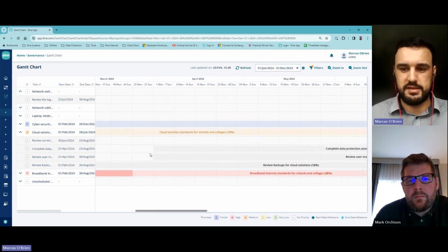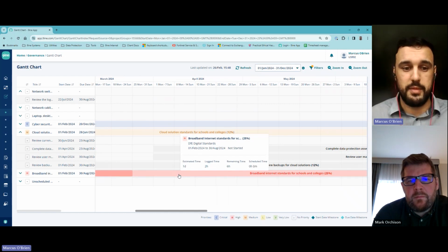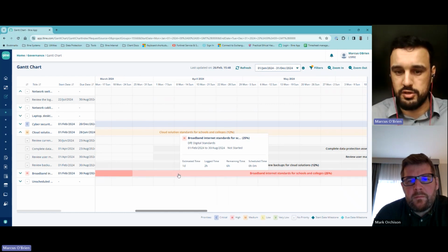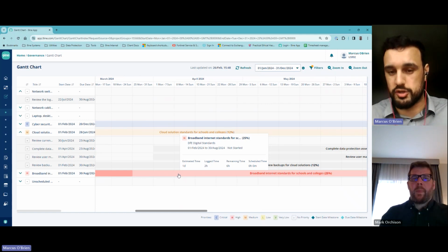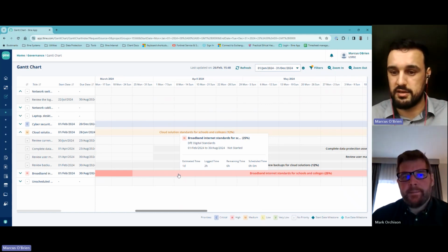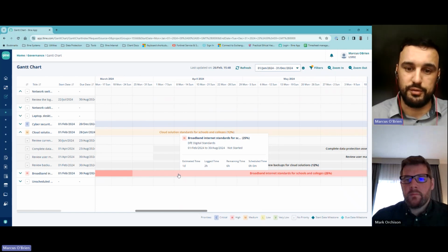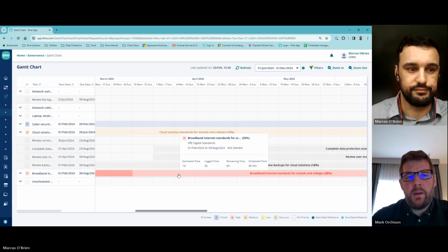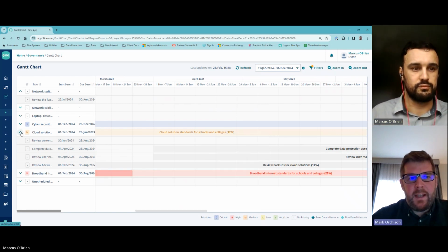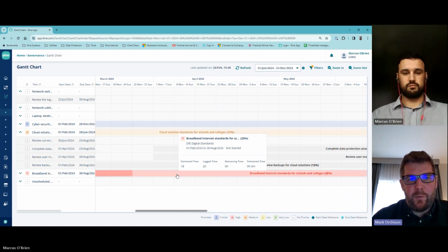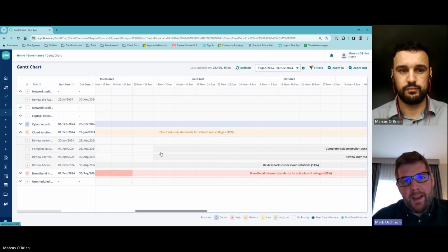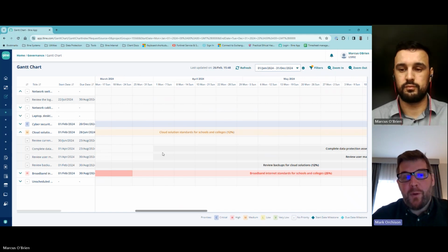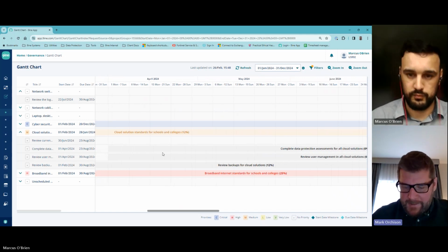And then if I've actually completed any of those or put some time against them, it will come up with a percentage. So my estimated time versus what the log time versus what I estimated it to take. Yeah. So you can see if you've gone over budget or not. Perfect. So a complete assessment and then analysis of where you are, what needs to get done, and then from a planning perspective, automatically reports upon what you have planned out.